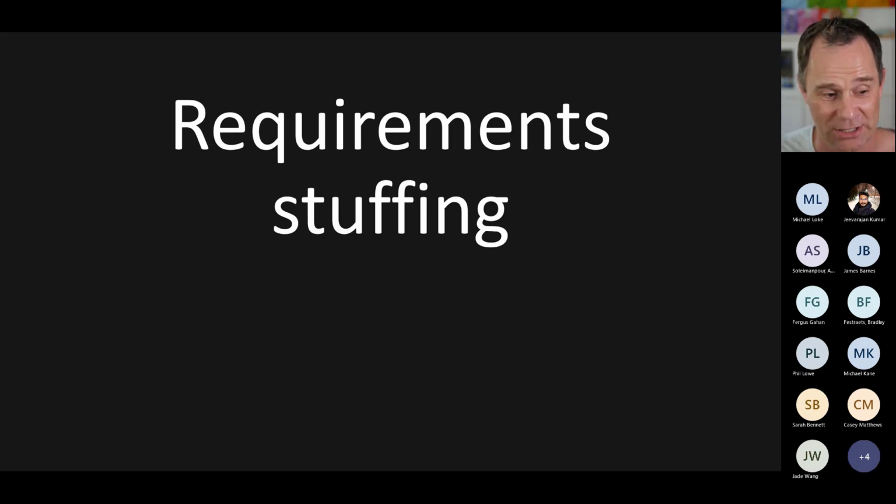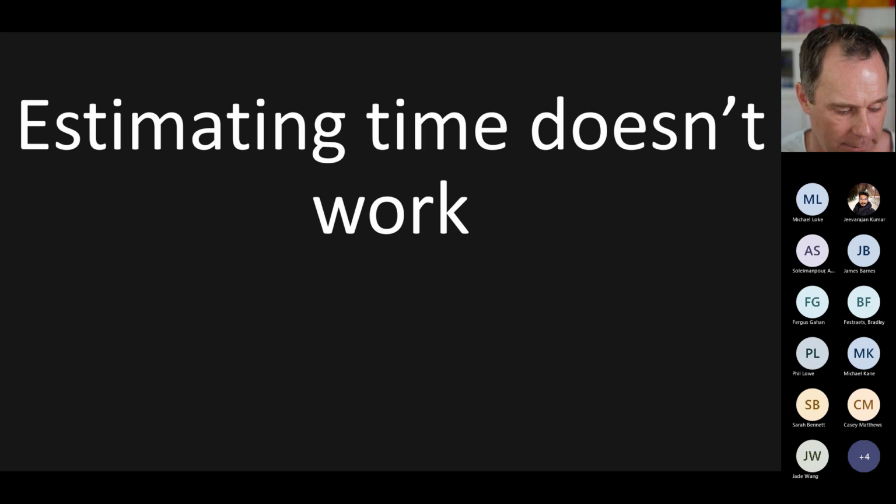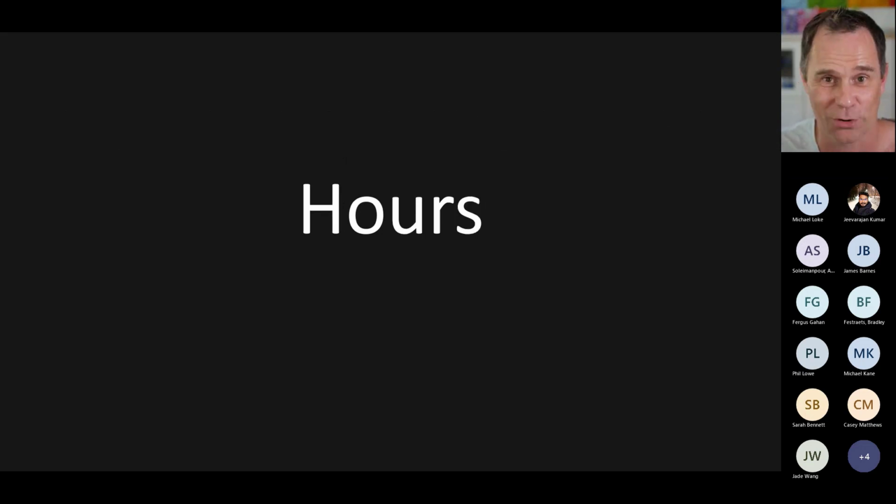Using story point estimation, I think we can handle those. I just want to reflect for a moment on why estimating in units of time doesn't work. A lot of us are comfortable estimating in hours or days, and those are great for invoicing, but please don't let your accounting department's invoicing preference wag the tail of the dog and tell your delivery team how to estimate or what units to use for estimation. My teams still invoice in hours, but we estimate in story points.